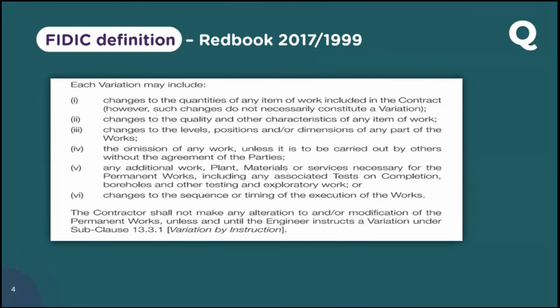The engineer will come and go. But when you are on night shift, your resources increase, your engineers increase, your site staff increase, which is not covered in the RFP. So when you receive such an instruction from the client, you should say, dear client, as per clause 13.1, section 6, it is mentioned that a change in timing or sequence constitutes a variation. We need additional cost for that.